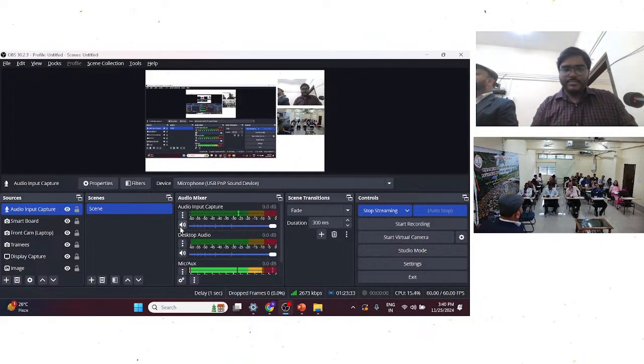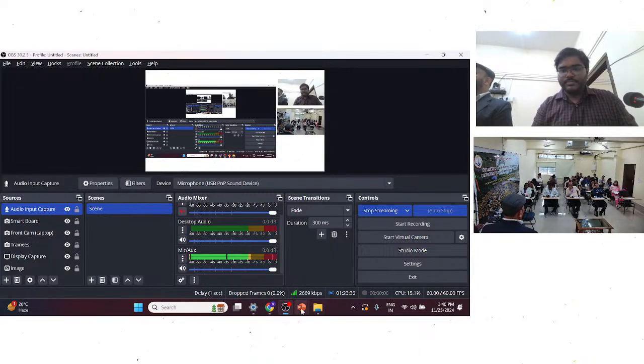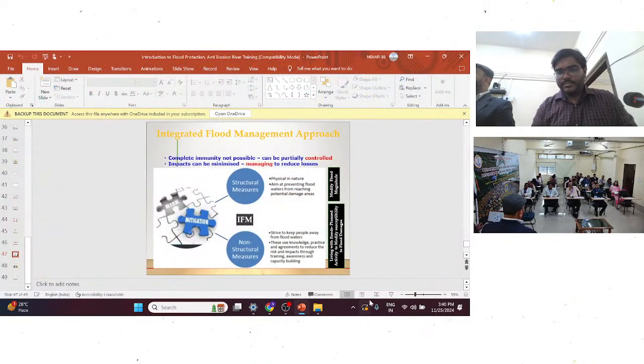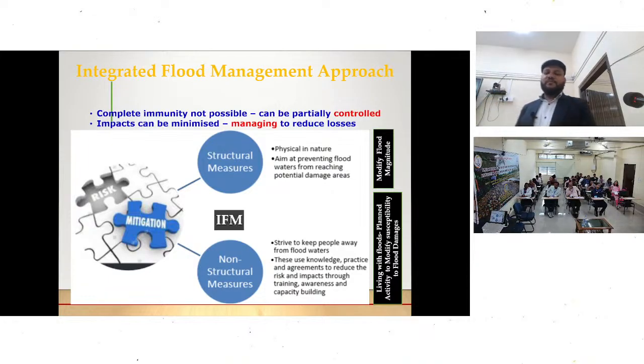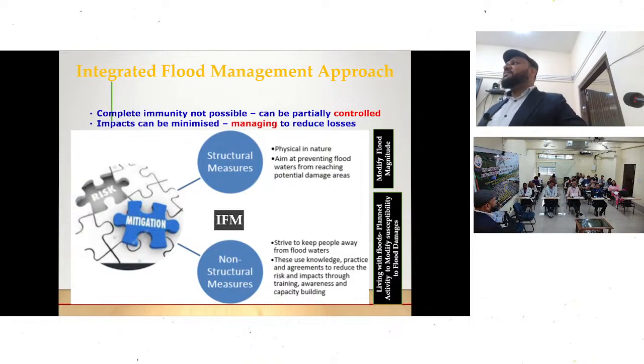In state project schemes, while preparing a DPR, we don't get funding for its preparation, unlike the Brahmaputra Board. In the Brahmaputra Board, I think 1 to 2% is kept as the scheme preparation cost for making a DPR project. In state project schemes we have to do it from our own pockets. You will not be able to do everything, but after completing this training you will definitely be better equipped to prepare a DPR. I must hope so.